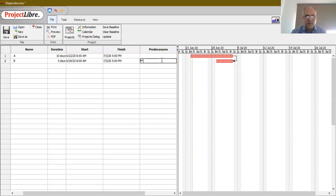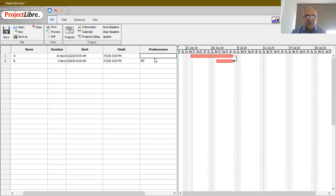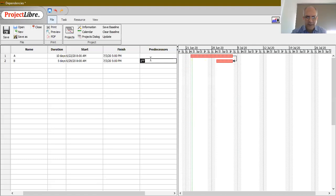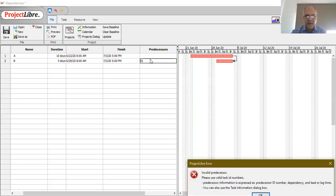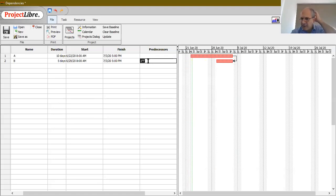Note that typing just FF or SS without the predecessor index number gives an error message. It is important to include the index number of the predecessor activity before specifying the type of dependency you want to introduce.